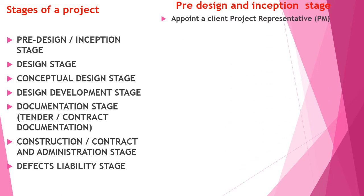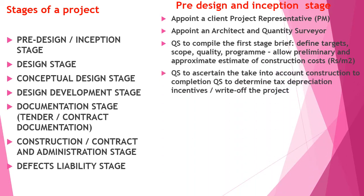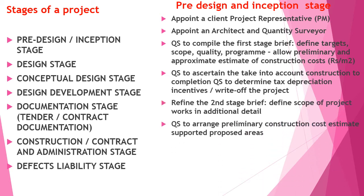In the pre-design and inception stage, with the approval of the client, appoint a client project representative, that is the project manager. Appoint an architect and a quantity surveyor to compile the first stage brief, which defines target scope, quality, and program. The QS is to assess time from commencement to completion and to determine tax depreciation initiatives for the project.